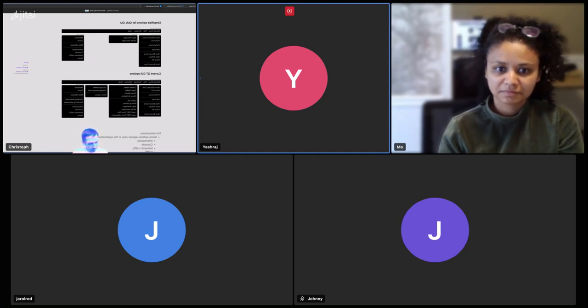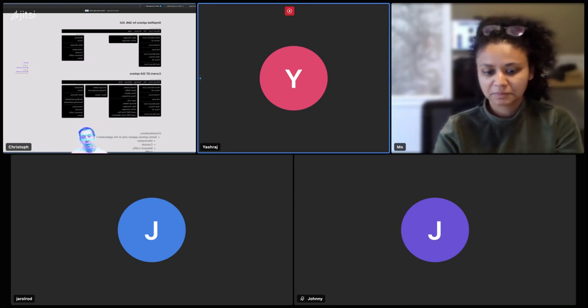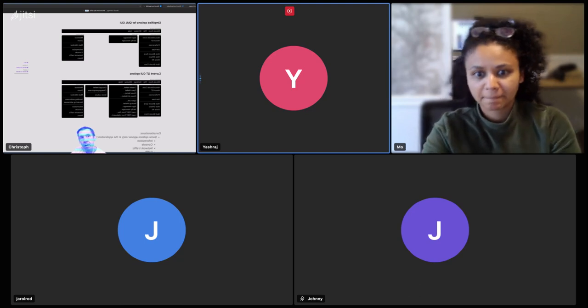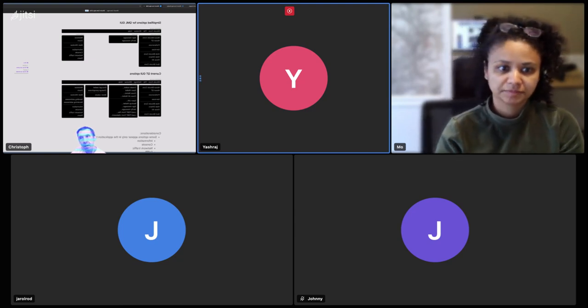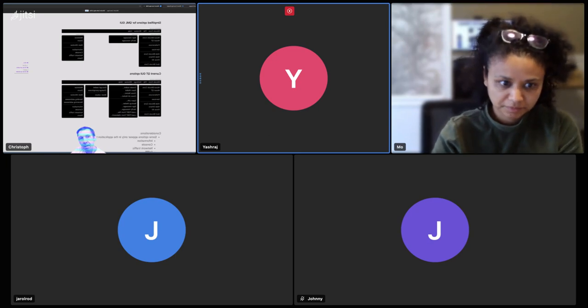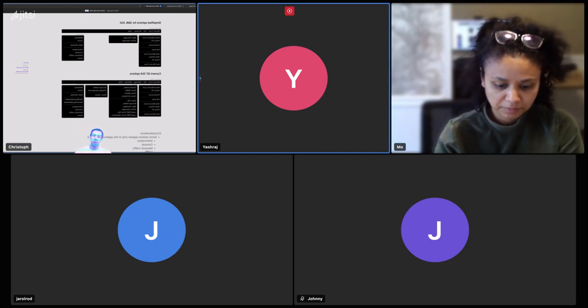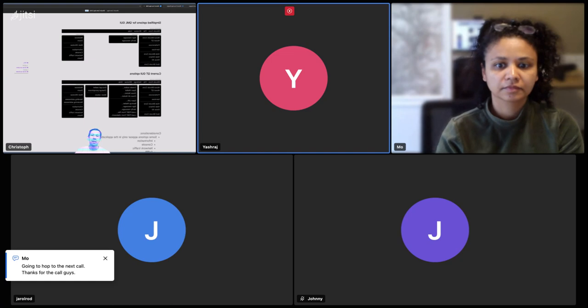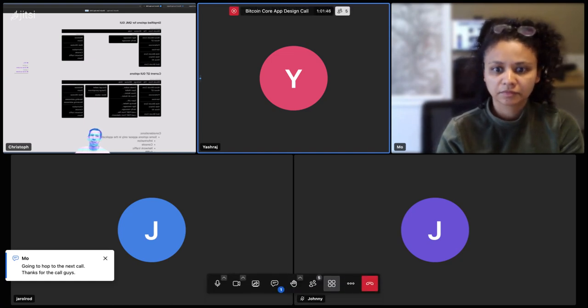With the Kanban board, we only have to do, in progress, and done. What we can do is bake our process into these, adding certain items: to do, designing, design ready, development, testing, done. That could be a way to bake our process into this.